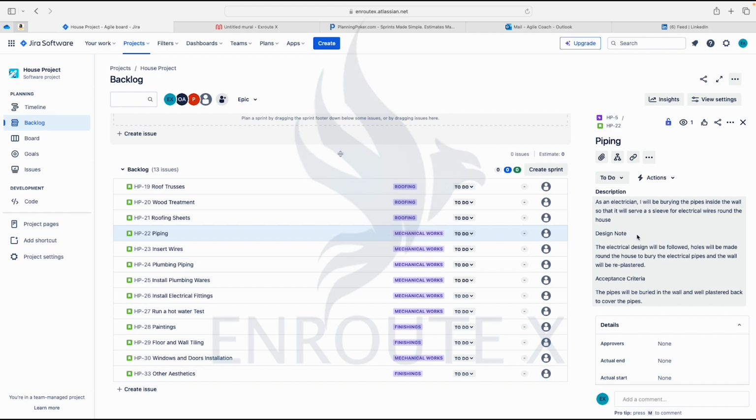So we now need to check during the sprint planning, each of the stories and ask ourselves, does it carry the needed information? The essence of the sprint planning is to ensure that each developer that would work on that piece of work clearly understands what needs to be done, without calling anybody, without asking for help. It's making the work clear enough so that they could deliver on it.